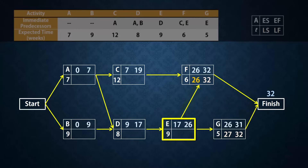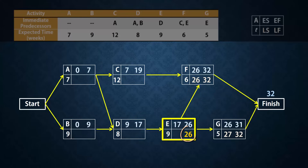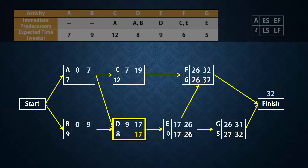E has two successors, F and G. The latest start times are 26 and 27 respectively. As a result, the latest time E has to finish has to be 26 in order for F to start. When doing the backward pass, the latest finish time of an activity must be the minimum of the latest start times of its successors. Thus, the latest start time for E will be 26 minus 9, which gives 17. D has only one successor, E. So the latest finish time for D will be the latest start time for E, which is 17. And the latest start time will be 17 minus 8, which gives 9 for D.